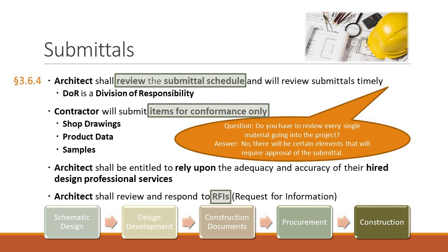A lot of this has to do with proprietary things, like the fire protection system and curtain walls. They're proprietary intellectual property, so the contractor and their subs will handle that. Shoring and bracing, where you're digging holes and you want to make sure the land doesn't move, that's another place where the contractor is responsible for the design side. So, as I said, generally in the construction contract, they're going to say, I'm not responsible for design, except for this one area where there may be some specifics where the architect says you have to bring the design professional in.